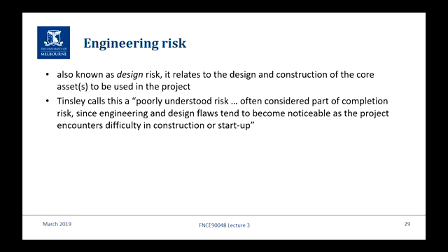Oh, it's not working, but it's all here, it all looks great. Something went wrong. Hopefully it's just a programming error or something like that. But it might be the physical equipment is not fit for purpose or whatever. It might be that the way they put the whole facility together doesn't quite work. One engineer did the offshore design, one engineer did the onshore design, and they actually didn't marry up how it was supposed to connect.